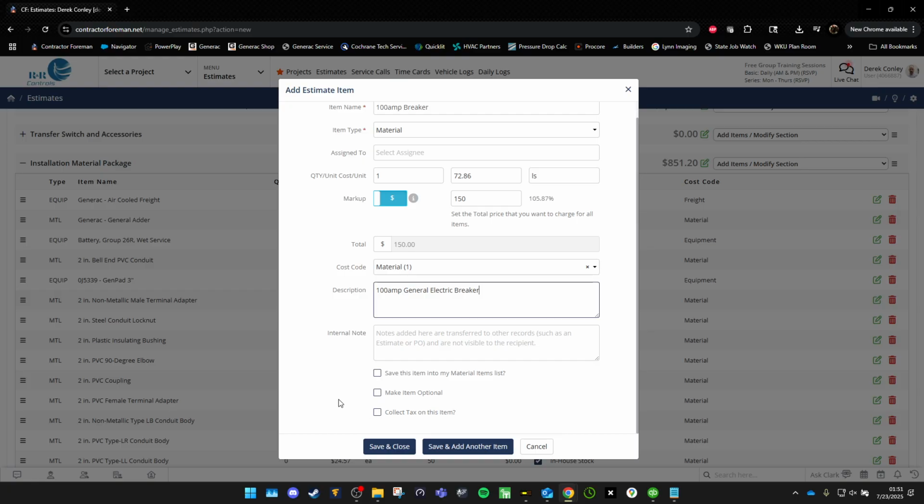Sometimes you will get a quote saying, here is a lot that you're going to quote. Here is your number with freight and tax included. So always make sure if it is quoted material to verify if you need to do tax or not.